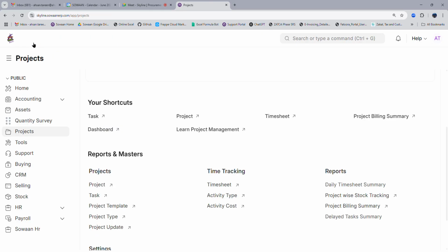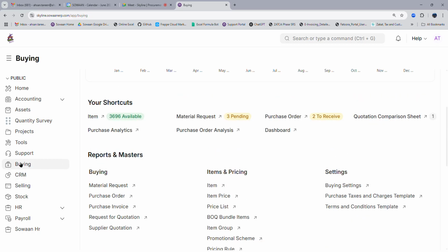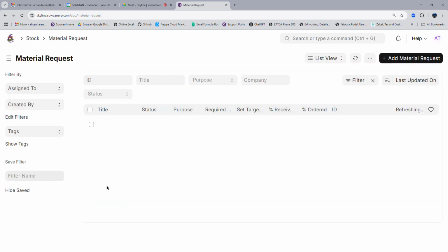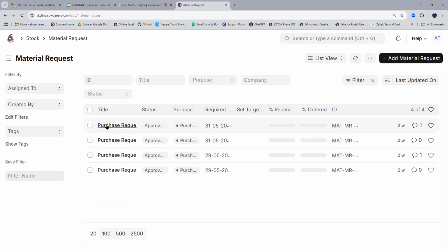So before I go to trigger the particular document, I want to show you what the cycle is here. You see, this is a material request document. That is what is going to work for you to request anything you want on site for a project, and this will push further for the RFQs or maybe supplier quotations and for the purchasing element in a purchasing department. But this is the source document, and this document is also going to be reflected on the task, on top of the task. This is the list in it. This is a record. These are some filters.